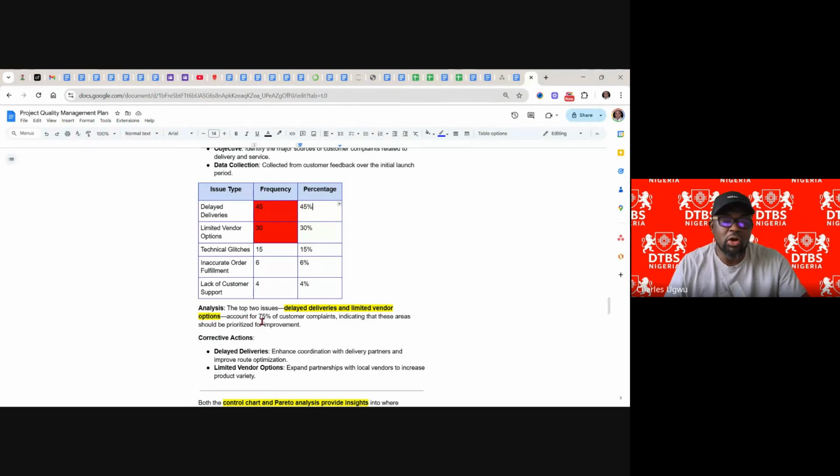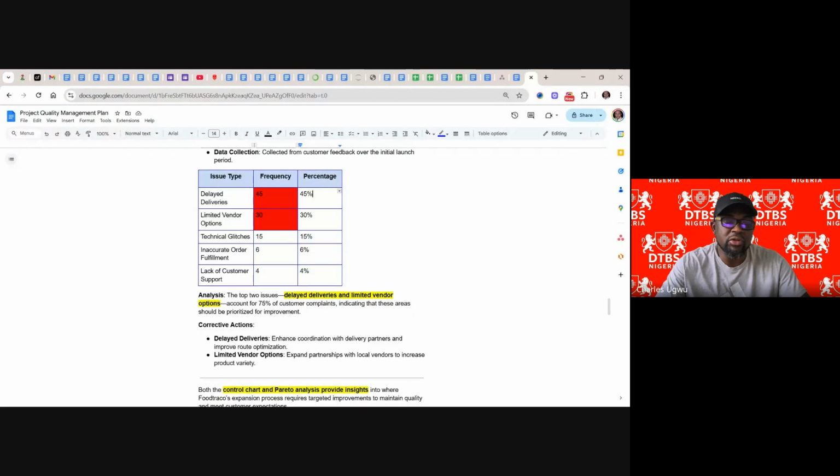Analysis: the top two issues, delayed deliveries and limited vendor options, accounted for 75% of customer complaints, indicating that these areas should be prioritized for improvement. Corrective actions.